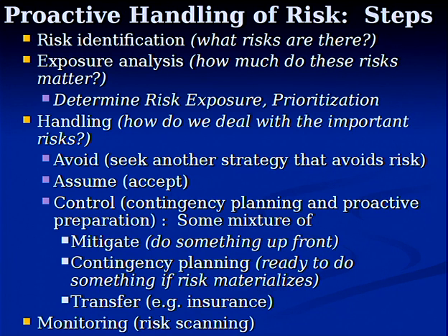So exposure, trying to figure out what risks are really likely to be potential problems, and then how do we handle them? And I want to delineate several steps. And these are, man, you folks listen to this lecture carefully. Those who are undergrads will be in great shape for a lot of components of the final. Okay, you can try to avoid the risk entirely. Like say, okay, yeah, we're not sure the latest iOS is really flaky, and so we'll only claim to address pre-Yosemite Mac OSs, what have you. Or we won't try to handle Android 5 devices because we've heard odd things about it. You just rule it out.